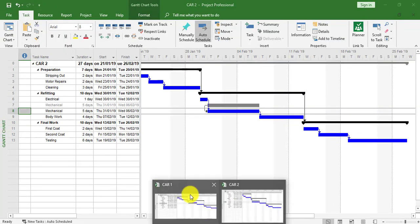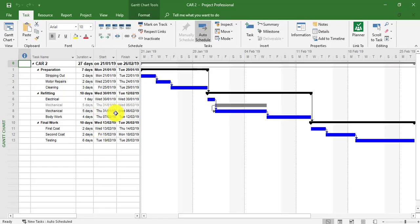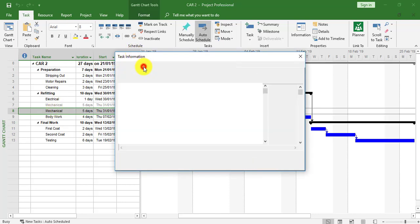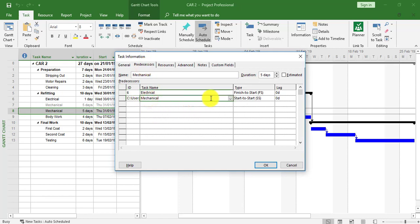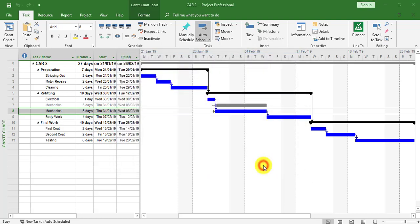I'm going to keep Car Two open and close Car One. In Car Two we can see the grayed task linked to Car One. I'm now going to make a link change within the sub-project Car Two, which will then affect Car One. I'll double-click the mechanical task and go to the Predecessors area. I can see the mechanical task has a start-to-start link with the mechanical task in Car One, and I'm going to change it to finish-to-start — this time making the change within the actual sub-project rather than the master project.